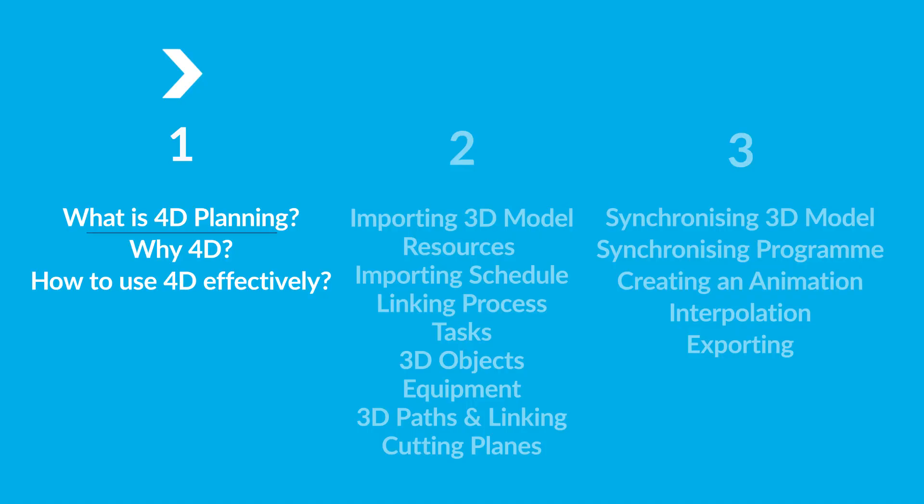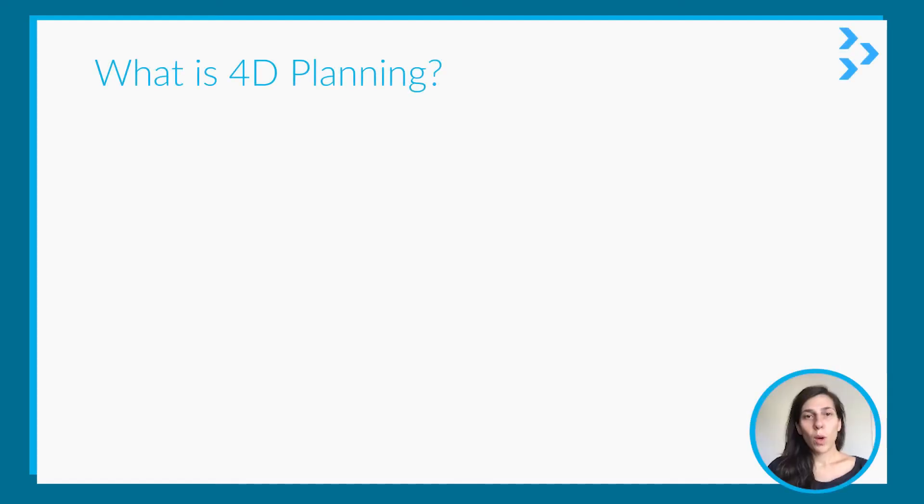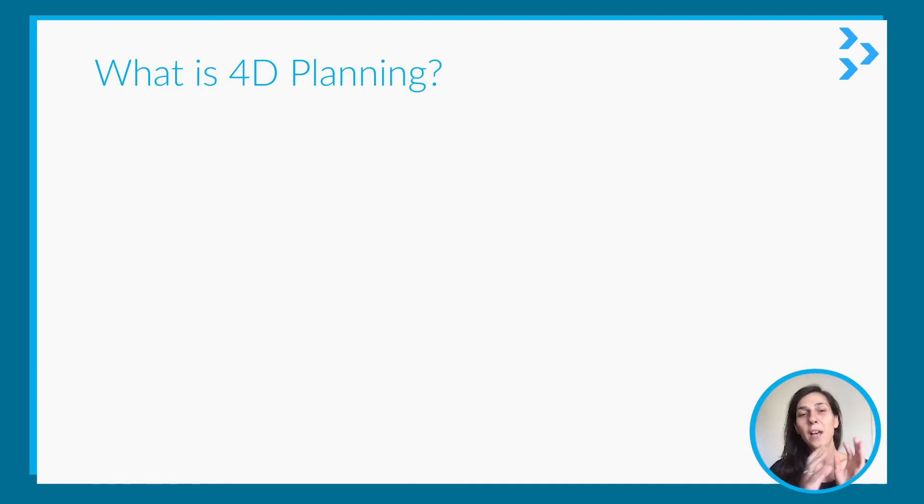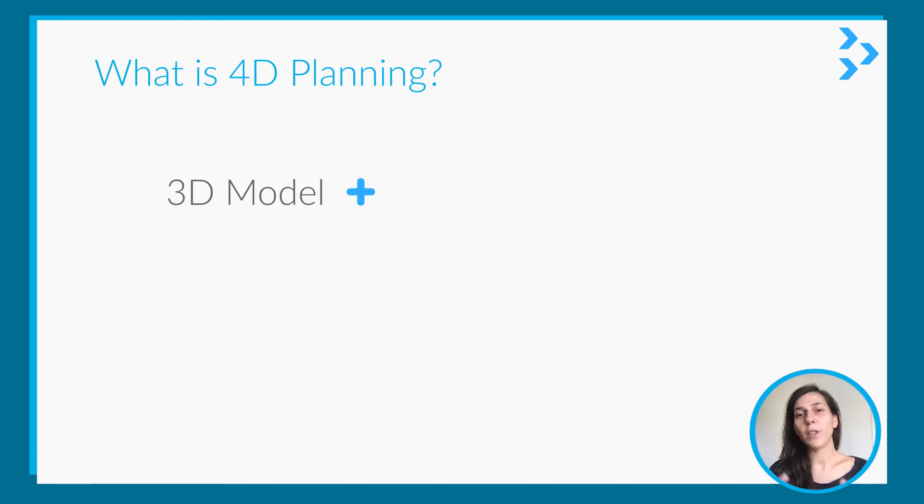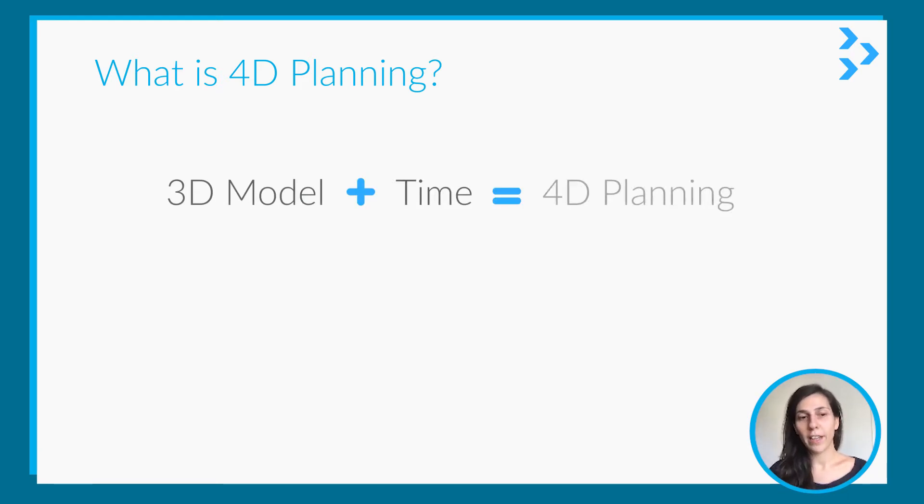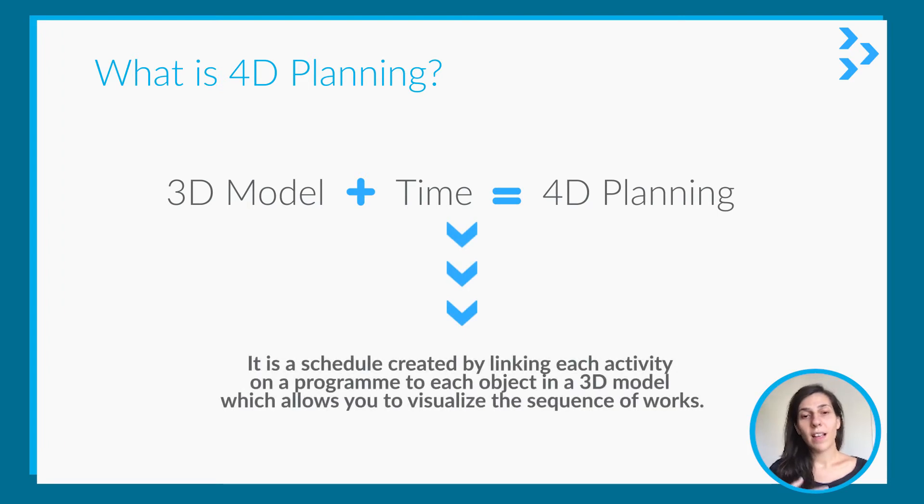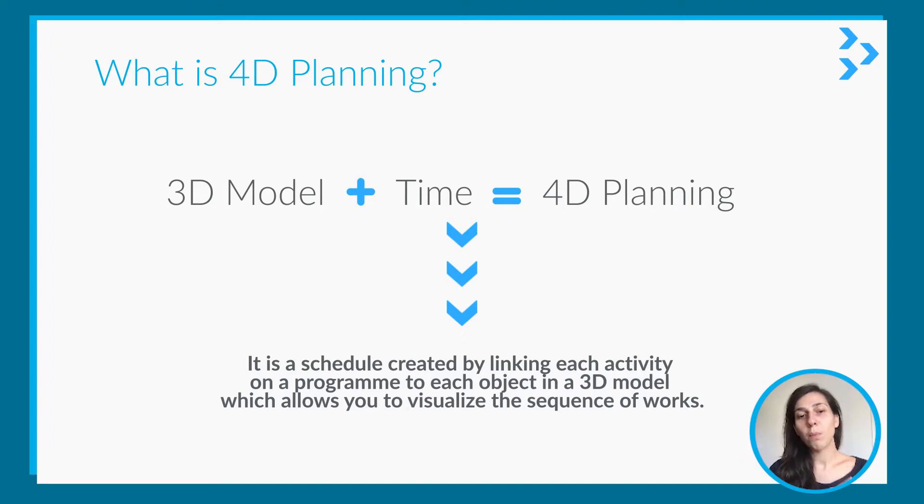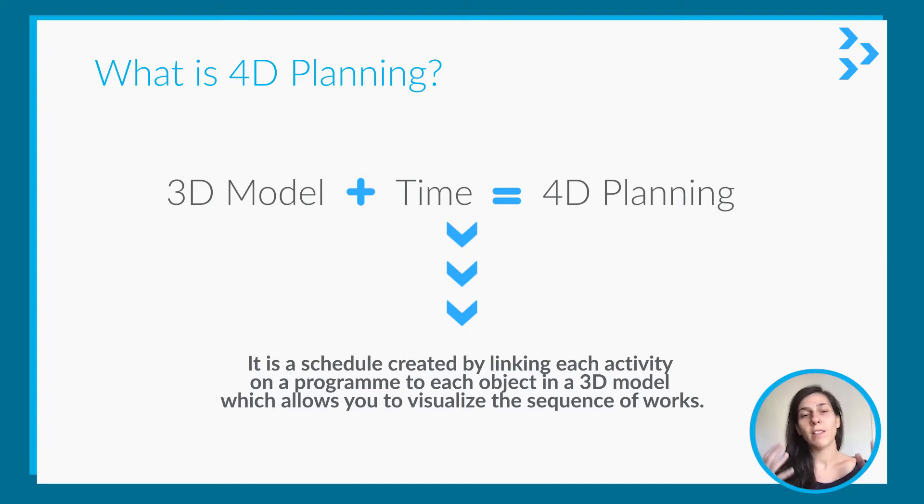So let's start with the first part. First of all, what is 4D planning? The fourth dimension is time. You have the 3D model, and when you combine the 3D model with time, it is 4D. In other words, it is a schedule created by linking each activity on a program to each object in a 3D model, which allows you to visualize the sequence of works.